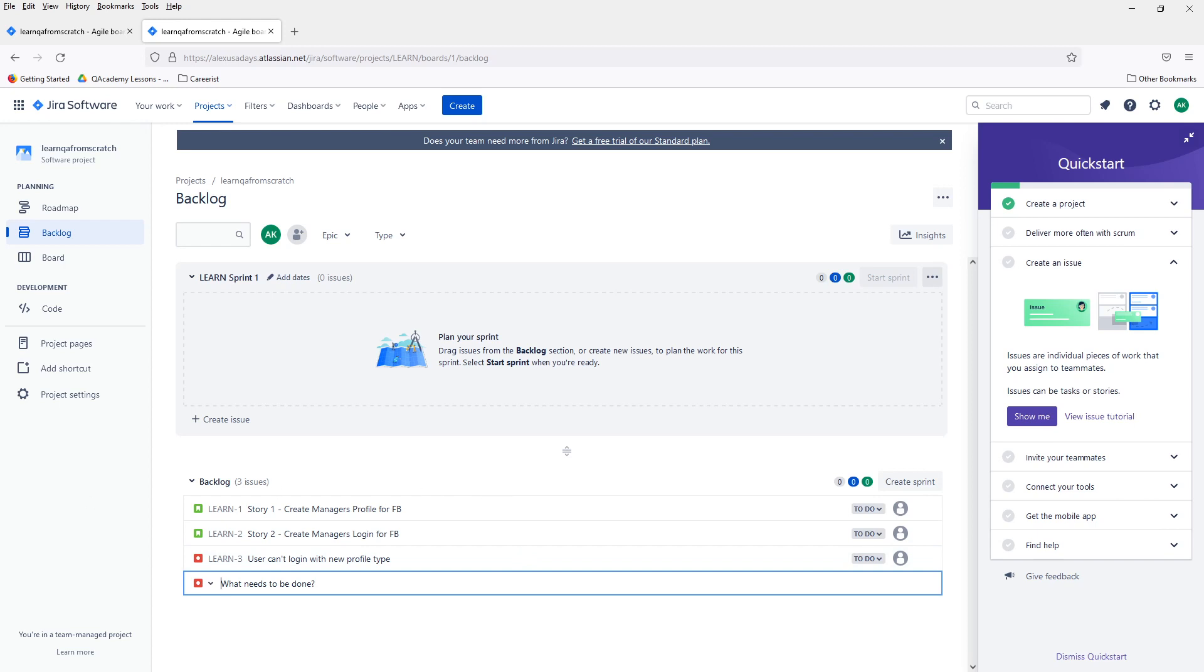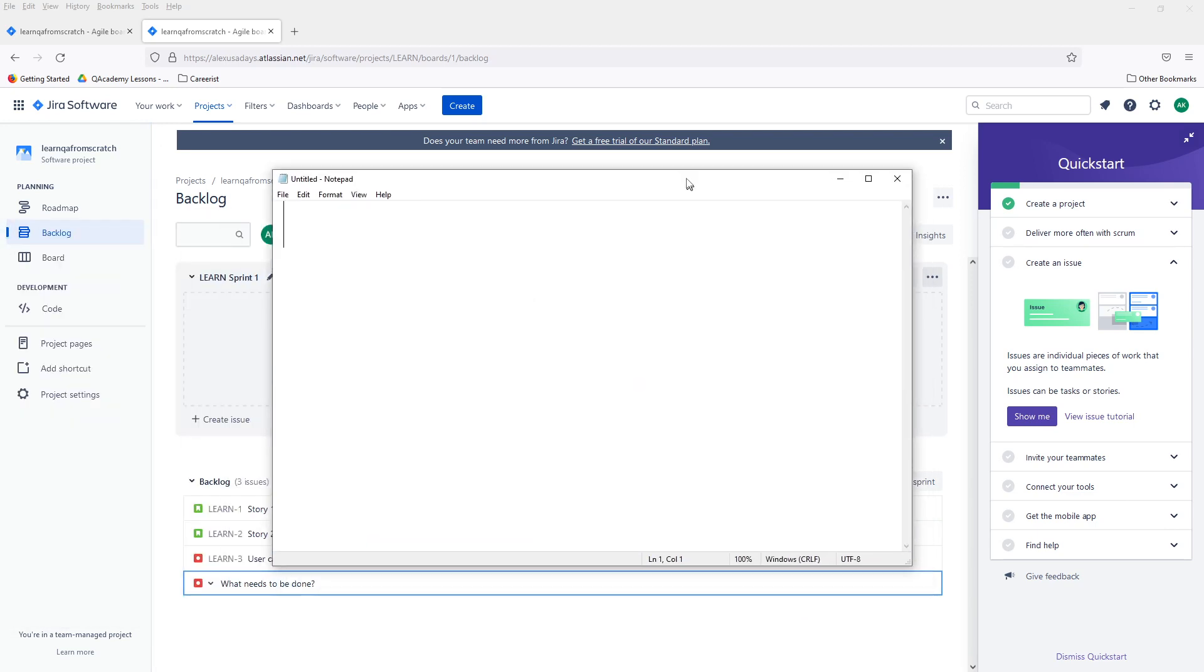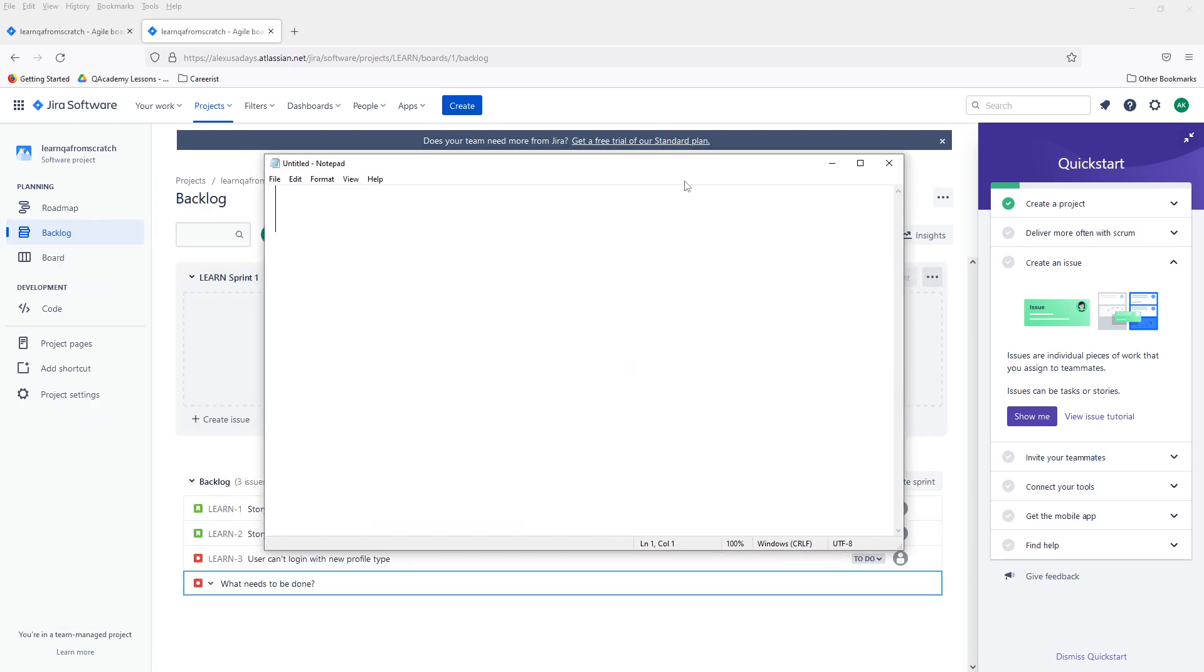And then maybe story two will add something like create manager's login for Facebook and so on. And let's maybe add a bug, user can't log in with new profile type. So this is just very high level. We'll go more in details later on. But essentially, before the sprint starts, there is a meeting called sprint planning, and all team members get together and developers assess the complexity of stories. So developers discuss how much time is going to take to complete story one and how much time is going to take to complete story two.